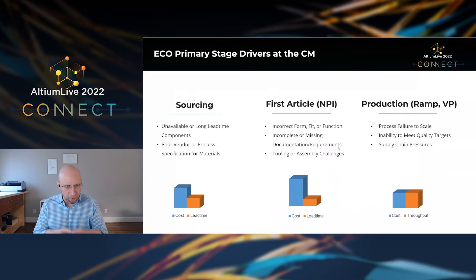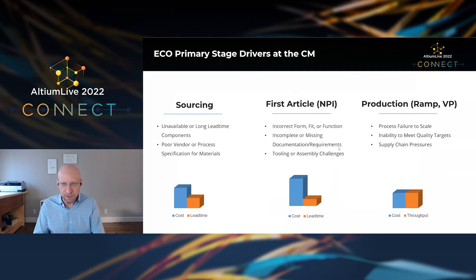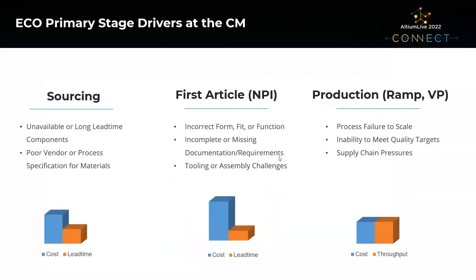From the contract manufacturer's perspective, there are three stages in production where we tend to see change orders. The first is in sourcing, usually triggered by unavailable or long lead time components, poor vendor selection, or process specification issues — for example, an injection molded component not meeting quality specifications, unable to produce in time, or costs changing as they learn more about the design. In sourcing, the primary impact is on cost, but there are pretty significant lead time impacts as well.